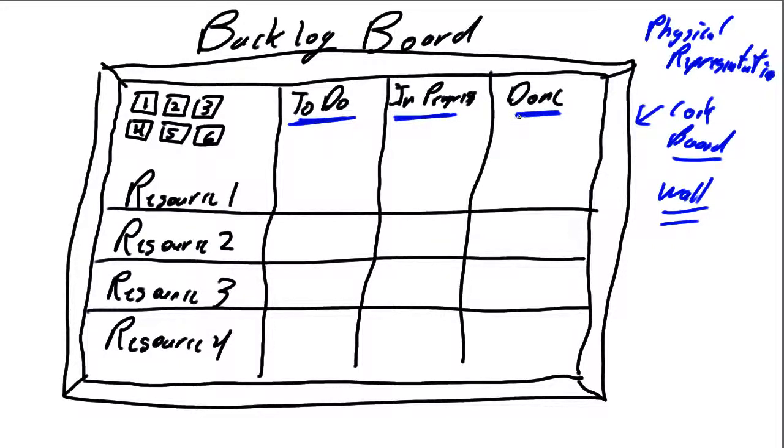During your Sprint planning process, the resources pick the stories they're going to work on. So, during planning, resource number one said, I'm going to work on story number one. So, that gets assigned to resource number one's to-do area.